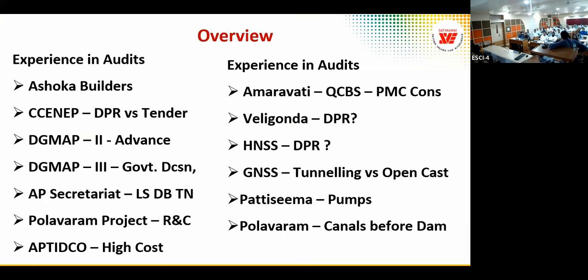And the Indian company started. Obviously, when you are short by 85% for the project implementation, as per the CVC guidelines you are not eligible, but you were made to execute the project. And they failed to execute the project, and the project was terminated. It had to go for risk and cost. They encashed the performance bank guarantee of 750 crores, and risk and cost tenders were called. There were 5 bidders.